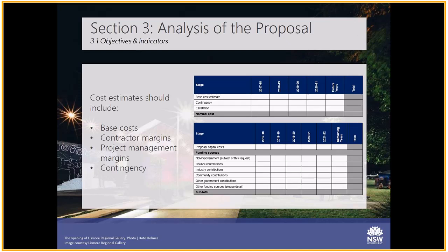In section 3.5, it also requires applicants to demonstrate how your operation will be viable in the future. You will need to list all costs needed to operate the facility or the project in the future and estimate the annual cost to your organisation. Ensure this includes maintenance costs needed to ensure the project deliverables will be kept in working condition and fit for purpose in the coming years.